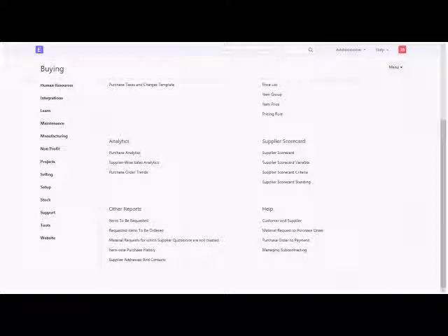For example, take the construction industry. Once construction projects are going on, we always require raw materials to be supplied at our project site. The biggest challenge is that most of the time the procurement team and senior management do not have good visibility of a particular supplier, whether the supplier is the right vendor to supply our required raw material on time, with quality and no rejection, or not. So the supplier scorecard has to be designed.